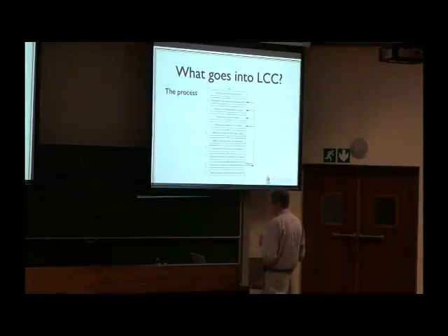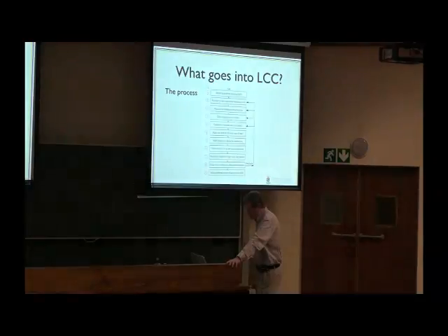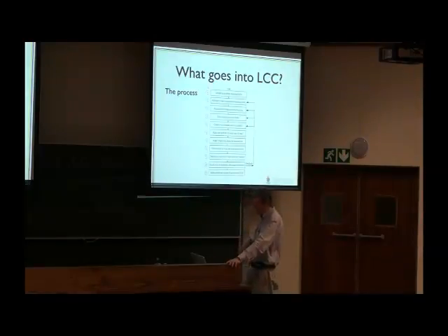So you start by defining the problem requiring life cycle cost. Then you look at alternatives and acquisition costs, sustaining costs. You identify that. You prepare a cost breakdown structure or tree. You choose the analytical cost model that you will be using. You gather cost estimates and cost models. Make cost profiles for each year of study, and those are deterministic cost profiles. Make break-even charts for alternatives. Pareto charts of the vital few cost contributors in the process. Sensitivity analysis of high costs and reasons. Study risks of high costs, items, and occurrences. Select the preferred course of action using life cycle costs. Do those steps one by one. Okay.